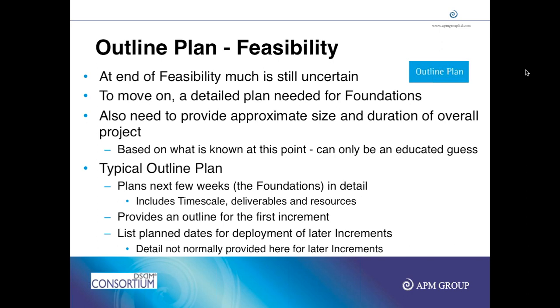What I do in my outline plan is I just quickly show you approximately we will take 12 months to complete your project, and if I start in January, around Christmas I should finish, and I will charge you about $100,000. I can have a few milestones to be shown, like the requirements analysis should be done by April, development completed by June, testing around this time, and so on. That's my outline plan.